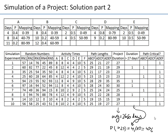Finally, we compute the probability that each path is critical. Path A→B→C→F is critical 40% of the time, path A→D→C→F is critical 0% of the time, and path A→D→E→F is critical 70% of the time. With 10 experiments, we're getting reasonably accurate estimates, and we could do further statistical analysis to compute confidence intervals. This concludes our third simulation example.